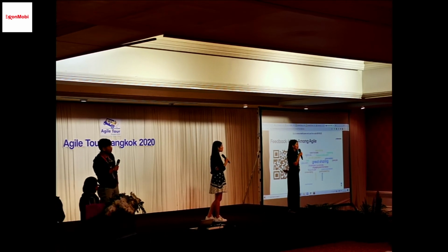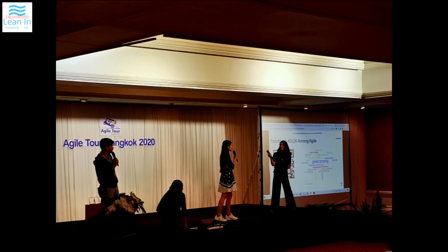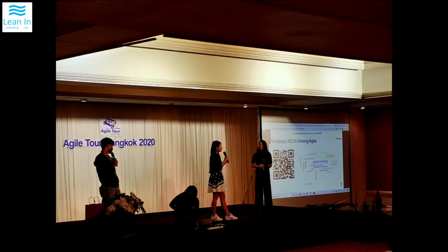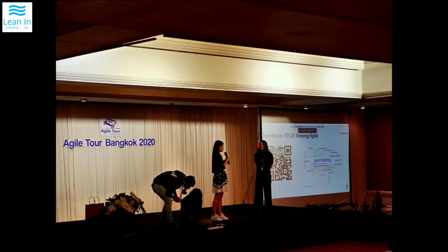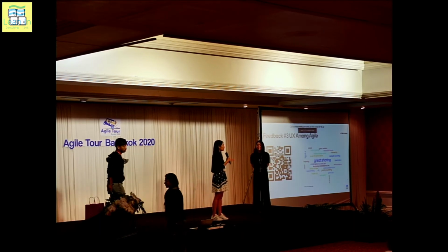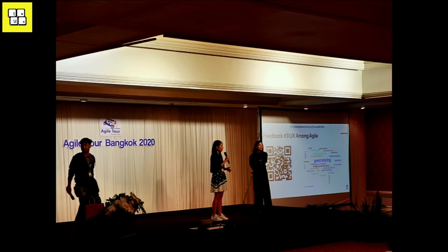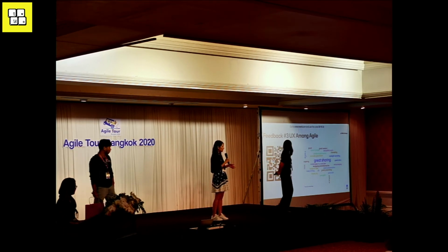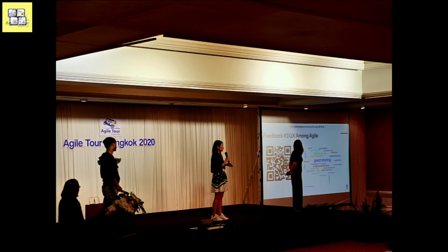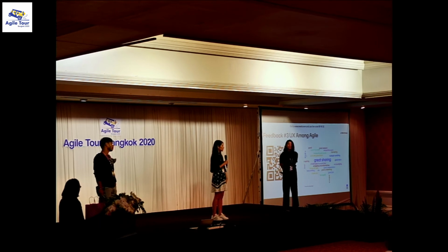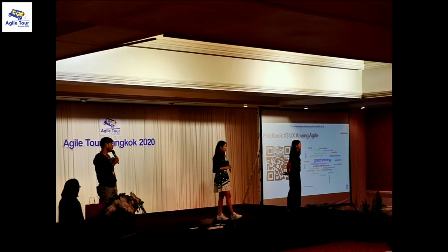Okay, it depends, right? Yes, because it actually depends. Usually when we have a new requirement, we start with research first, to see whether the idea is worth doing or not. Then we plan together as an agile team how long the implementation will take. If the implementation period is quite long, we can set a break for a demo or UAT to get quick feedback before the assessment. It's quite dependent. Okay.